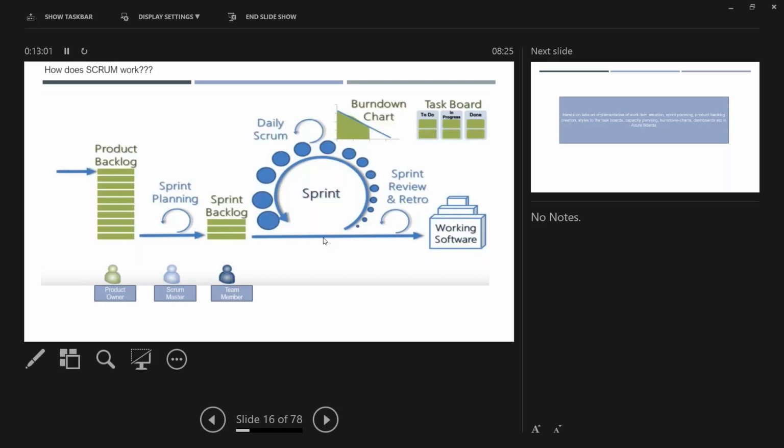So you do the daily scrums like this to understand what you did yesterday, what you do today, and what you will do tomorrow. If there are any issues, you only mention the issue, but you don't solve it in the meeting. You finish the meeting and then go and solve it. That's the purpose of your daily scrum. Then you do your coding or designing, whatever it is for that day, and it repeats for the entire sprint and each and every sprint.